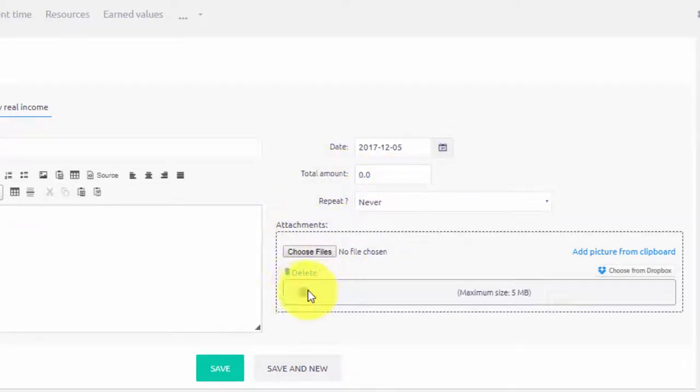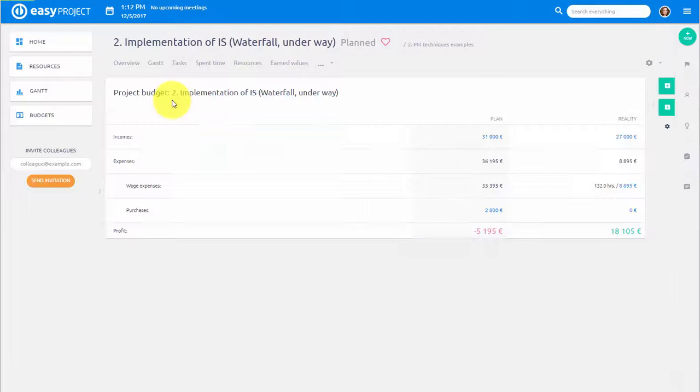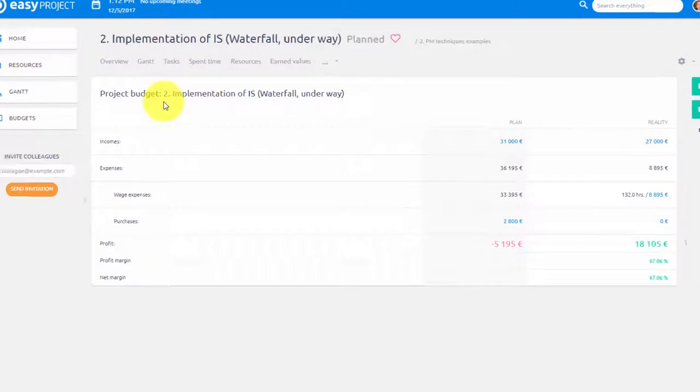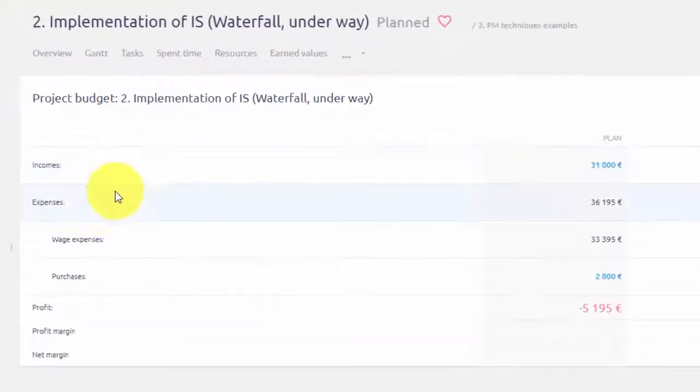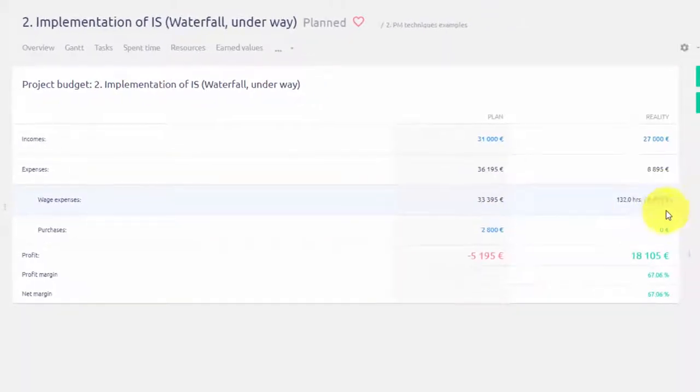The key feature of Easy Project is automatic calculations of wage expenses which are based on number of hours logged by users in Easy Project and set hourly rate which together give the total wage expense.